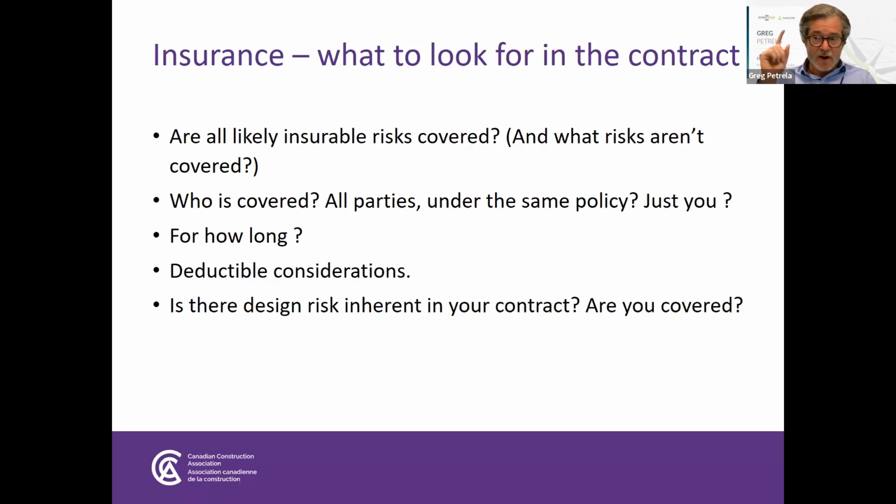So they've got to keep an eye on what the wrap-up deductible is. First of all, did I build in that coverage into my policy? And if I build it in, what is the maximum deductible that it will help me insulate? So it is doable. It's way more difficult to do on builder's risk policies, okay? And frankly, that's where a lot of the bigger exposures exist.